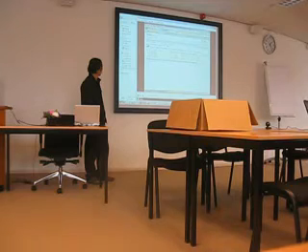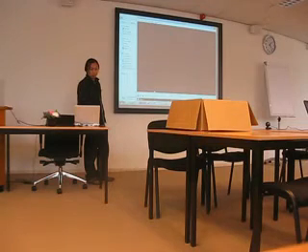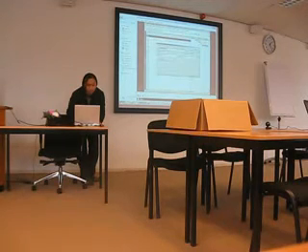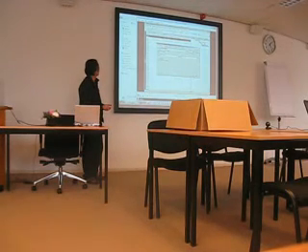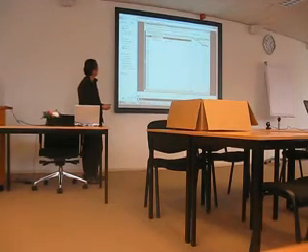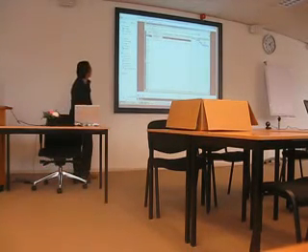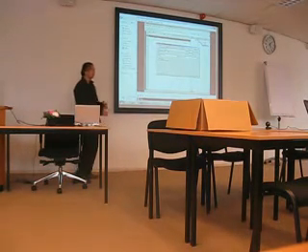Let's now switch to the Microsoft Project file on Paul's desktop. Now this is Microsoft Project. Clicking on that particular task, we can see that it still says 0% complete, because it is still not updated. This is because Paul has not yet synced up the desktop project file with the server. To sync up, Paul simply clicks on the Valley Speak menu, followed by the Get Updates from Server menu item. This is the key. After the sync up is complete, we can see that the particular task now shows as 9% complete. That's the logic.